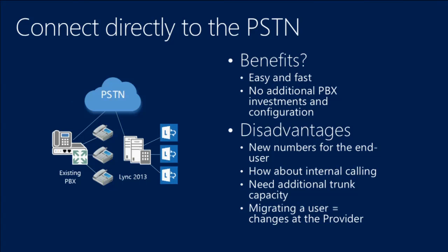So you don't need to talk to anyone on the PBX side and say, well, please manage this, make these configuration changes. There's no additional investment in the PBX. So if you have this approach and you migrate users from one system to the other, eventually if no users are left on the PBX, you just turn it off. You don't need it anymore.